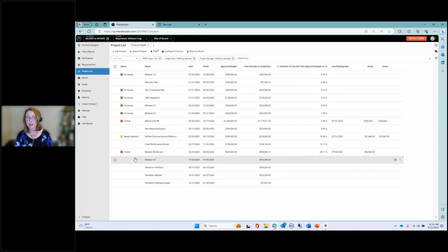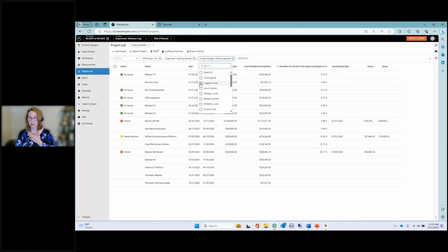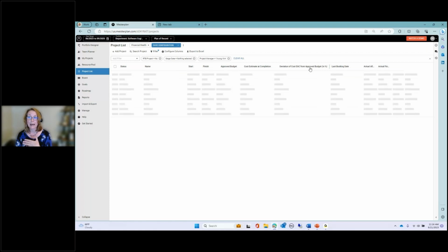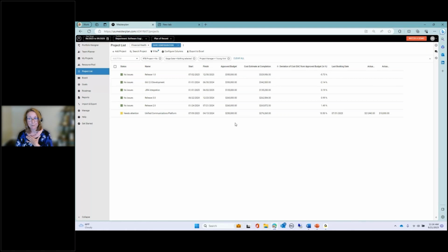So this is the first area that, as a project manager, I would be using to monitor my projects. Say I was Kim Young, I could click logged in user if I'm a project manager, Kim Young. Of course, I'm not logged in as Kim Young, so I'm just going to pretend. I can focus on my projects first and sort these columns by the deviation to see how far off I am from the budget. This gives me the opportunity to address whether I have issues that need to be looked at, or how I'm going to control the costs on this project.